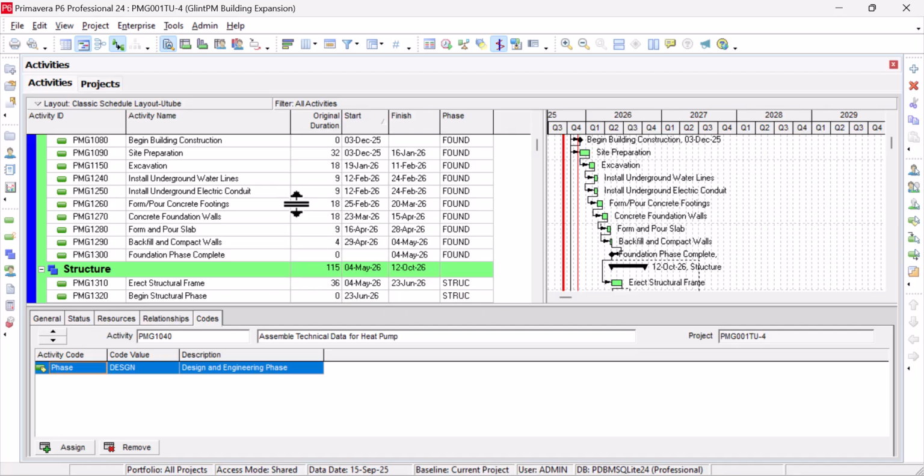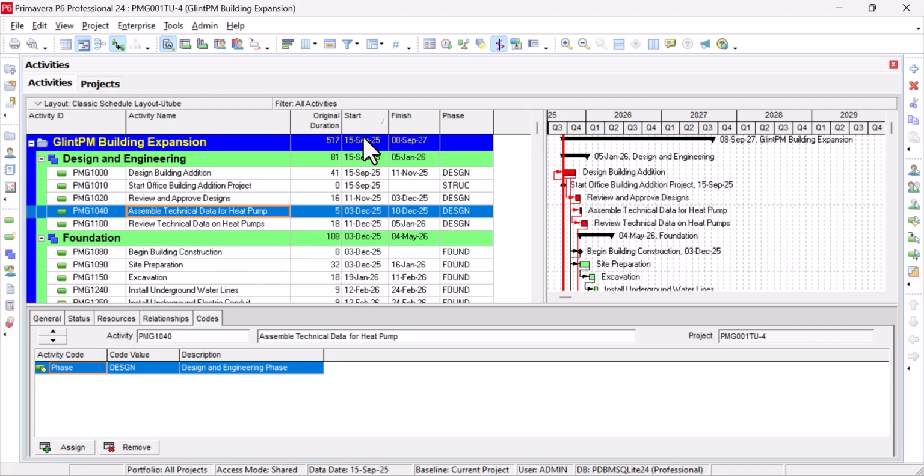The next clip, I want to assume we have added all the basic data we need for our project schedule. So therefore, we can now baseline our schedule. Remember our schedule is starting 15th of September. So which means if you are following this tutorial, we have started this project schedule before now. Usually for you to generate new schedule it takes time because it's going to be going back and forth in review and it will need input from all the stakeholders, your project team, and even the sponsor. So it takes time before you finalize your baseline schedule.